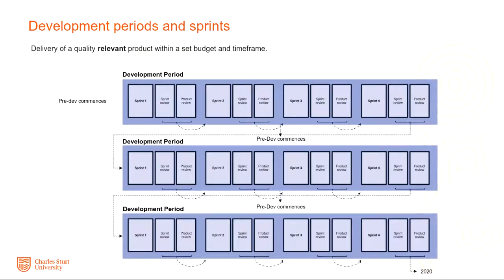At the end of those sprints, the subjects are finished and they go to the quality assurance person. But the work is finished and the development team move on to the next bank of subjects. And this is how we've managed to scale the development. So the key essence around what we've done here is around this approach. For us at Charles Sturt University, we're currently developing between 20 and 30 subjects per session. And that number will continue to increase. So in my previous role, those numbers were significantly larger, but it's just an issue associated with resourcing, really.